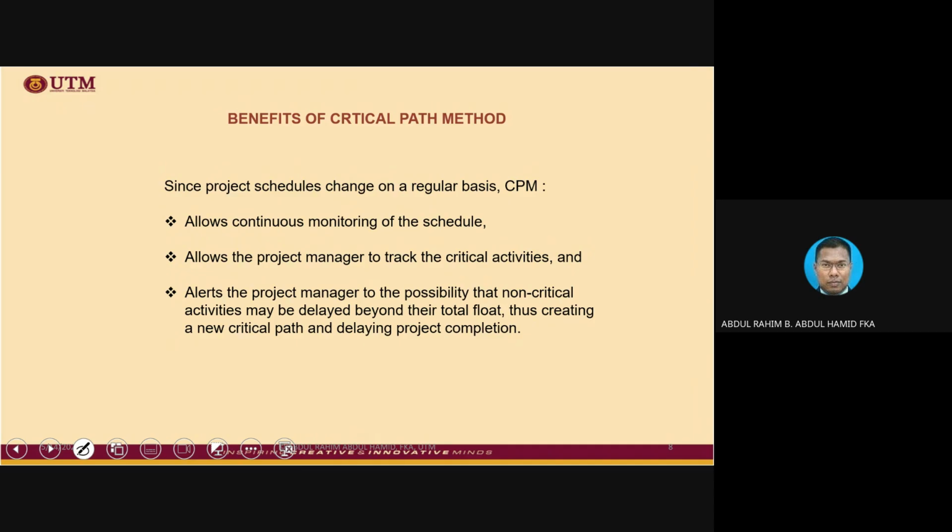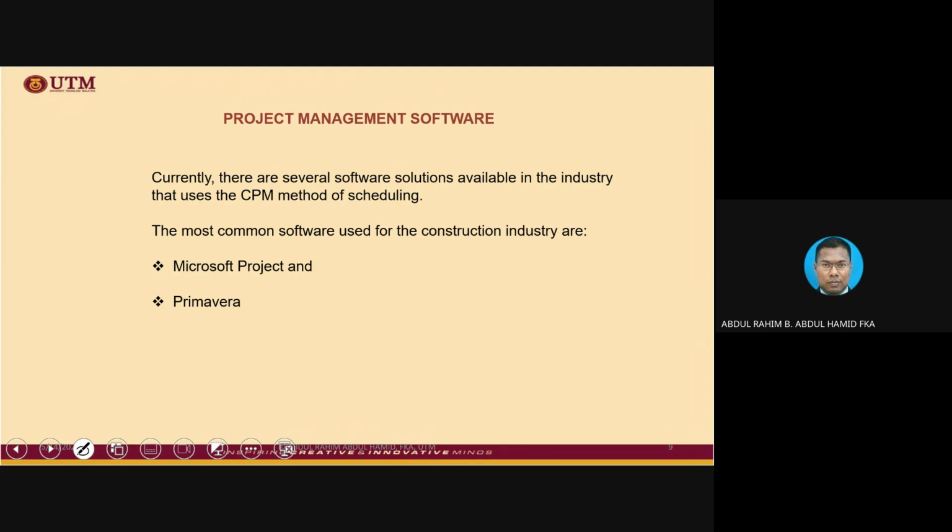Instead of having one critical path, we are going to have two critical paths, three critical paths, and subsequently we are going to get stuck because we do not have plenty of time left, because every activity now cannot be delayed. That is the issue.